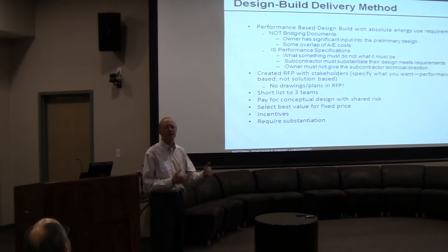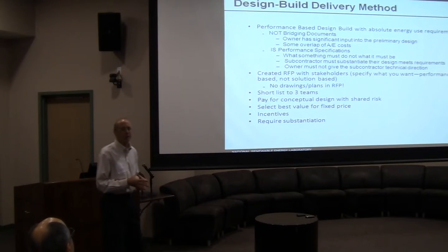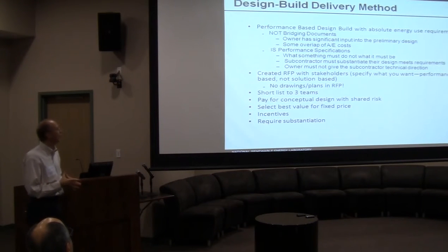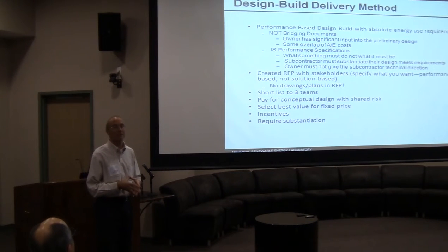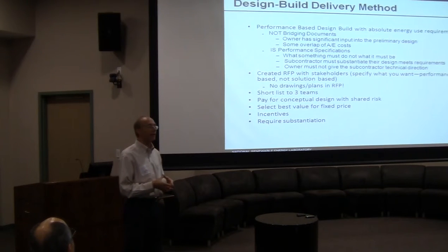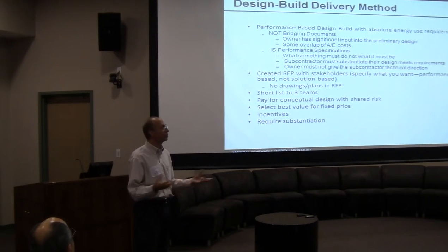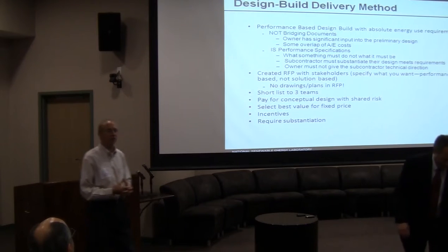We've heard that they did spend more money than that, but they weren't going to make money, but they really didn't lose a lot of money in that process. But it was important to pay them for that. In exchange, we owned those designs. And we were able to share those designs with the winning team, and they could opt whether or not to use some of those ideas in the final design.